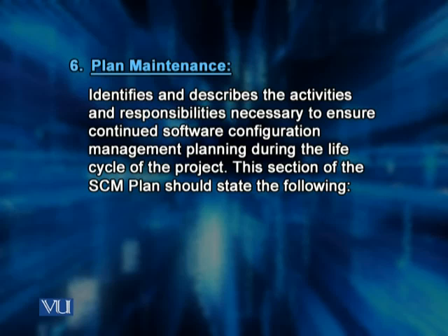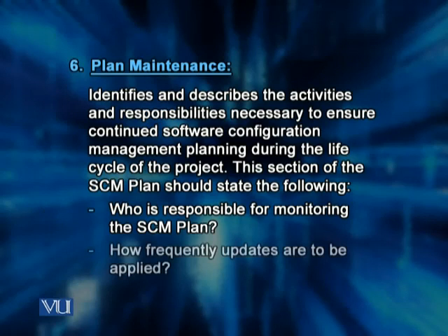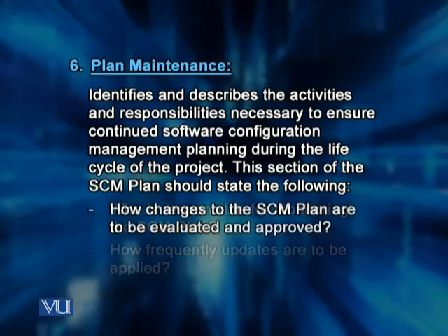This section of the SCM plan should state, number one, who is responsible for monitoring the SCM plan, whether it is being followed or not. Second, how frequently updates are being applied to the SCM plan. Third, how changes to an SCM plan are to be evaluated and approved.